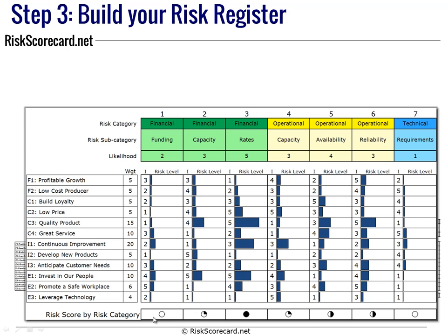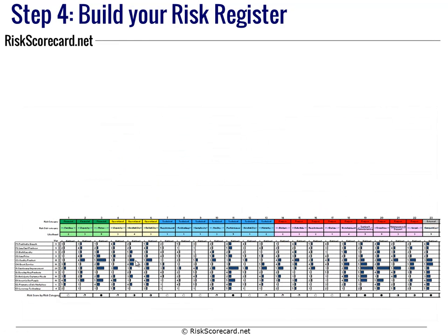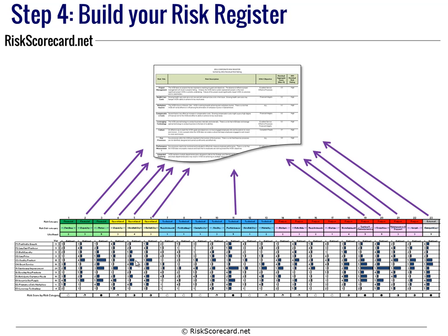So in this simple technique, we can begin to figure out which categories of risk are most impacting our organization based on the current strategy and strategic priorities. Based on that, we can then build the risk register based on anywhere where we have a significant risk occurring.